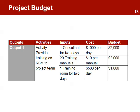The project budget lists the cost of all the necessary inputs required by the project. This might include personnel, basic office premises or facilities, equipment and materials, or services such as subcontracting supplies, training workshops, and other miscellaneous inputs. For each activity, a list of inputs is prepared, and this can be aggregated by category such as materials, equipment, and personnel. This can help produce the project procurement plan. The total cost of all activities and the administrative and other general costs represent the total budget of the project, and this plan will help monitor budget expenditures.